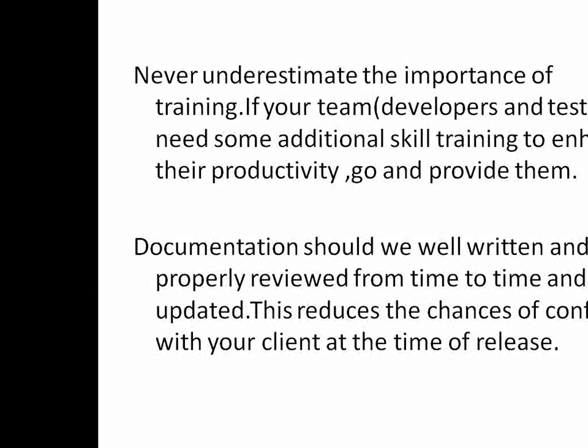Never underestimate the importance of training. To save some dollars, I will not go for the training. This is a bad scenario. If my team members, who can be developers or testers, need some additional skill training to enhance their productivity, go and provide it. Because if I can invest $100 in the training, they can do their work in a much faster way. They can save 10 days. 10 days saved is like $10,000 saved for the client. So it's a win-win situation.